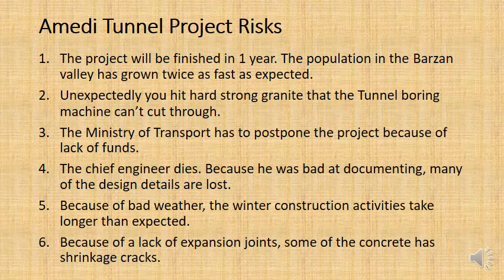Number 3, the Ministry of Transport has to postpone the project because of lack of funds. Boy, isn't that a risk that often eventuates in Kurdistan. We've talked a lot about that when we talked about time management. But yeah, the Ministry of Transport runs out of funds, usually because the government does not keep a lot of reserves. They don't have money kept in the bank. They normally just keep oil in the ground. And so if the price of oil drops, suddenly there's not nearly as much money as they thought there would be. That's sort of how the KRG operates at a government level.